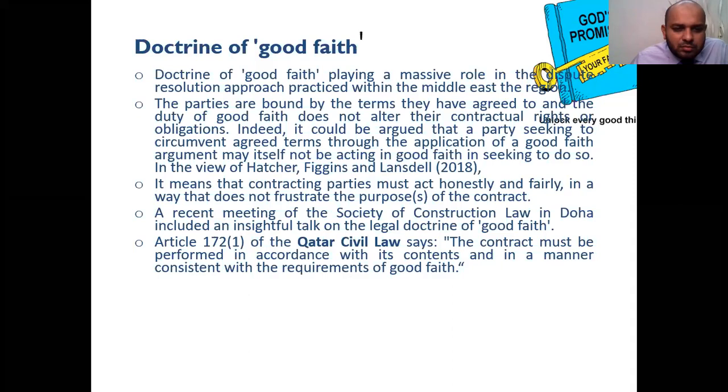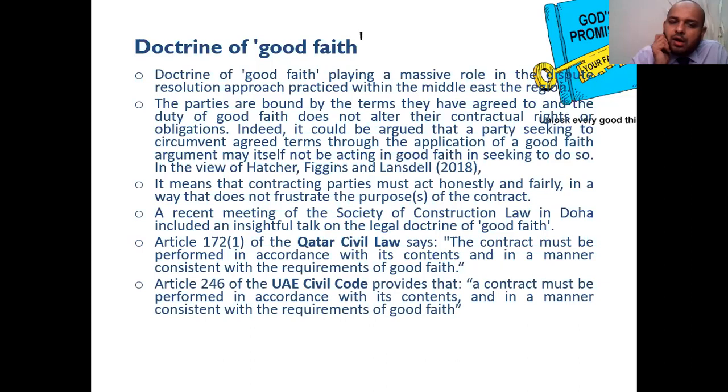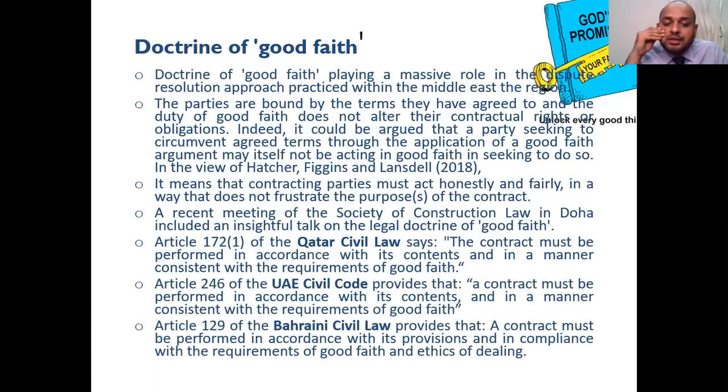Article 172.1 in Qatar says a contract must be performed in accordance with its content and in a manner consistent with the requirements of good faith. So you should perform a contract in good faith. It's very clear in Qatar civil law. The same wording is there in the UAE civil code, Article 246, and in the Bahrain Civil Code, Article 2129.